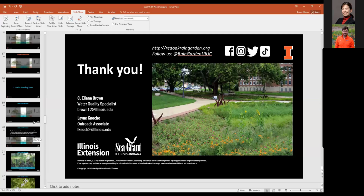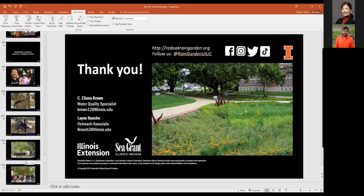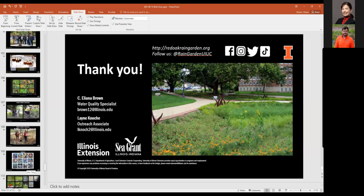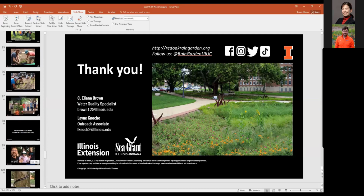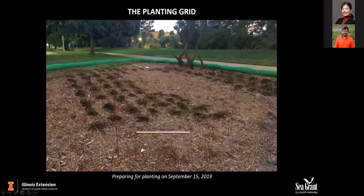The way that we adapted is we created a 20 by 20 grid that I made on the computer. And then we basically translated what was made digitally onto the actual site. If you go to presentation on this one, yes. So basically, see these fence posts that we have in the ground here. We placed those at 20-foot intervals and made squares. And then we translated what was on a piece of paper onto the ground. It sounds very complicated, and if I had one extra image, it would be easier to explain. But basically, we would come in. These are all holes for the ground cover.